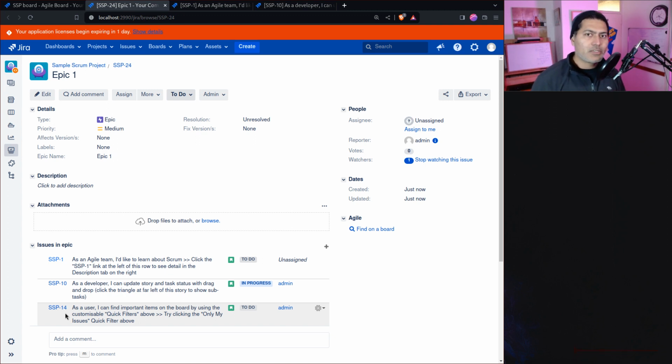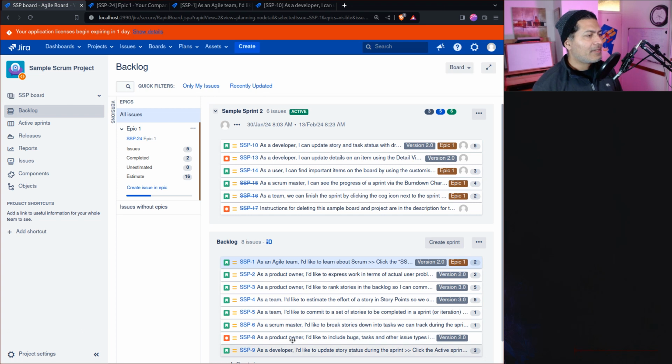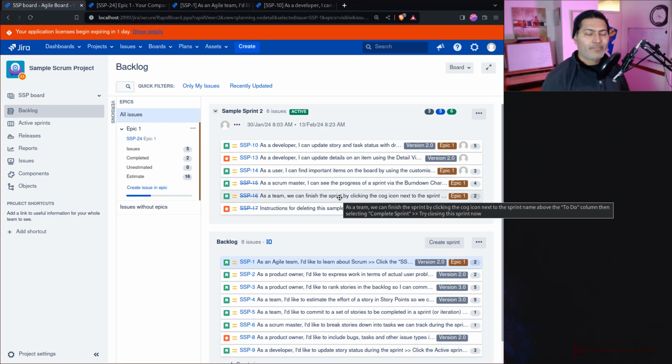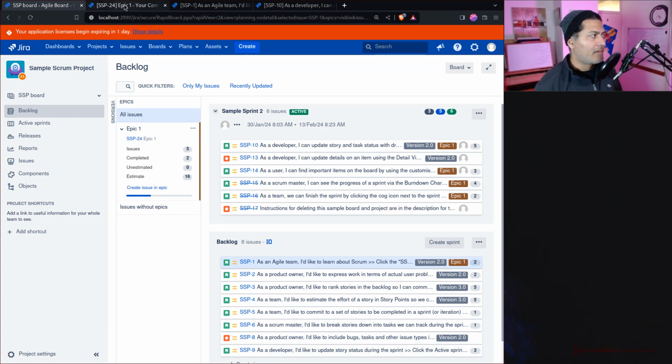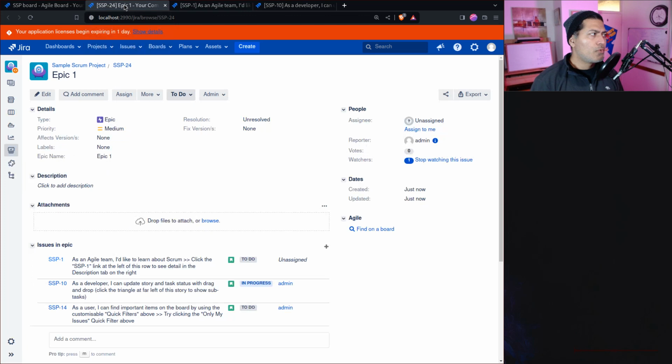And let me, of course, share my view on this. Now, first of all, Jira software is not configured natively to display these story points at the epic level. And of course, you can do this automation. That is what we are talking about. But even if you do this automation, you will not really have the story point sum displayed at the epic level useful in your reports, right? So this is something that you should be aware of.